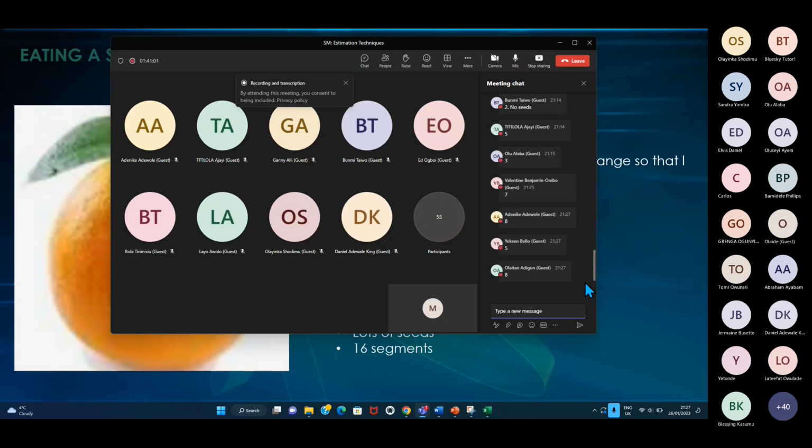Okay. There's no 7, 8. I can see 8, 5. Normally, when you are doing this, we should have a voting place where everybody votes without seeing what the other person put, and then you reveal it immediately. But because it's not possible this time around, that's why we are using the chat. Otherwise, we created a voting board, what they call a poker planning board, that would help us do it. But I tried it and it was asking me for a lot of things. You guys need to register and all that, so I just don't want to bother myself with that.